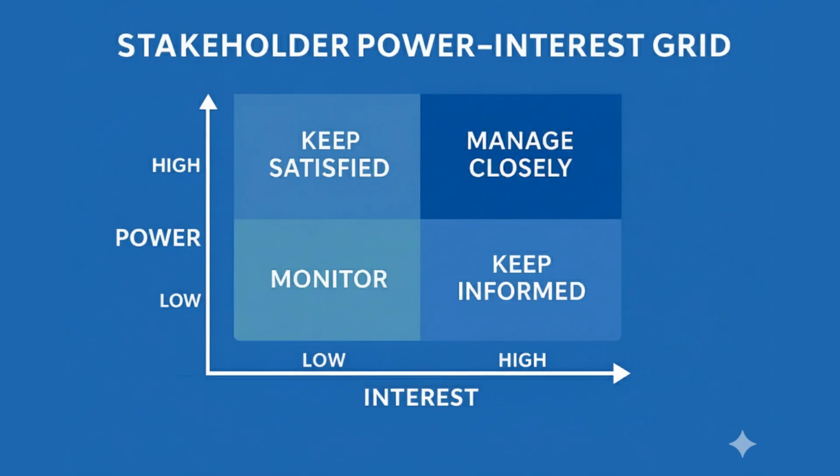You will have customer service representatives. For example, frontline staff, they care about usability. You will have retail and corporate customers, pilot users, who will have high interest in system performance. What is the strategy that you will use to deal with these kinds of stakeholders? You will conduct training sessions, you will use feedback loops, you will do pilot rollouts, you will send regular newsletters, question and answer sessions, change management workshops, and empower them to give feedback. You're going to provide regular communication to them. You'll be providing them progress updates and feedback opportunities. They can become advocates if engaged properly.